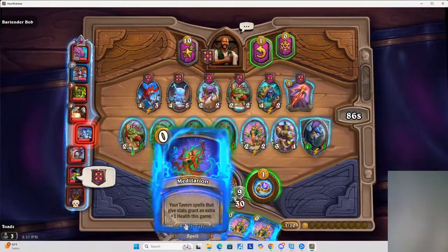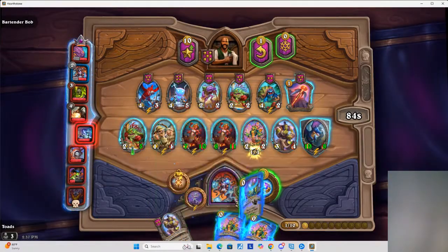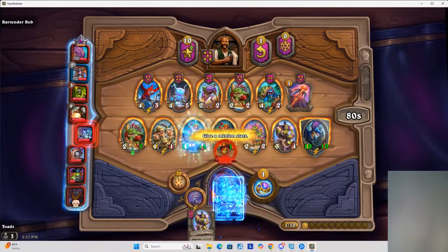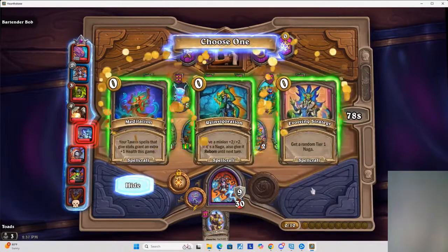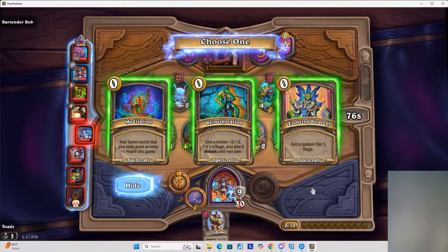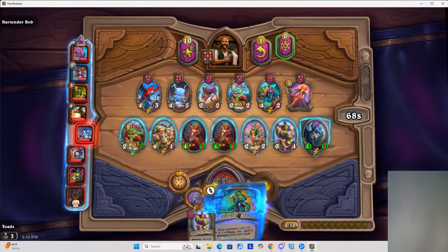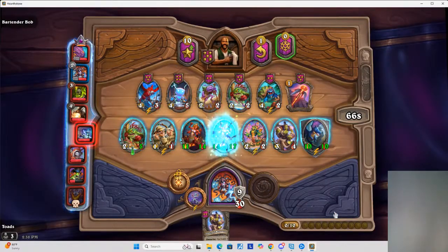If Beth tells you that her current lease is up in May and the landlord has a new tenant moving in, then time is the most important factor. If she says that it took 3 months the last time she moved her office, then the schedule might not be the driving factor. After you understand the project's time constraint, ask why the budget is set at $30,000.